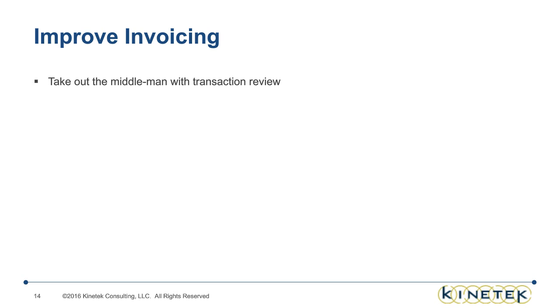And the traditional process for how that worked was somebody in the billing department would generate a report. That report would have all of my unbilled transactions on it. That report would then be distributed to program control. I would get that report. I would mark up the report with whatever I wanted to put on hold. I would have to send that back to the biller. The biller would go into Costpoint and put those amounts on hold. They would calculate the bill, and they would send me a draft invoice, pro forma invoice for me to review. And hopefully in that whole thing, everything got translated right.